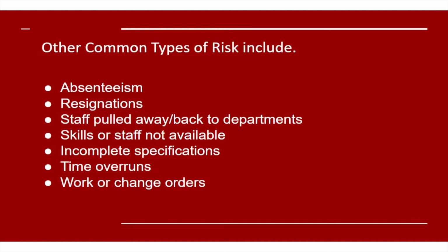Time and cost overruns. You expect it will take you 2 weeks to do, and it actually takes 3. Now, if you're running a shipyard where you have the yard booked for different boats coming in at different times, if one boat gets delayed, that has a ripple effect on everything else, right? So that can have a big impact.